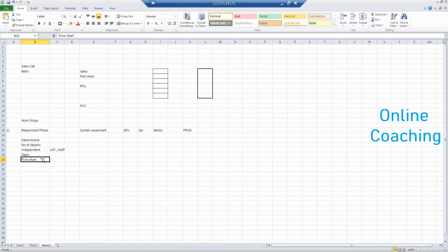So they have to literally see through the entire 6 months period or 1 month, 1 year period of this project, when do we need 10 resources, when do we need 20 resources, and they have to give this project plan, and that should fit in the project budget. So that is one of the critical games that we play as project managers, to ensure that we still fit in the budget and consider more number of resources working on the project. So that is the ramp up and ramp down model that we generally create.